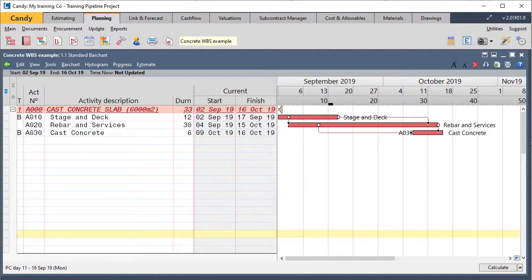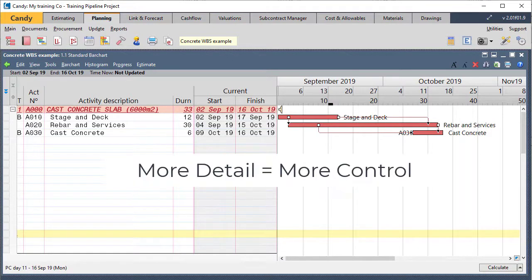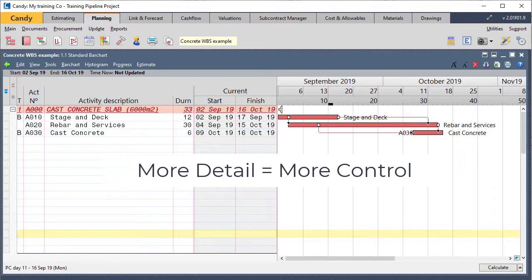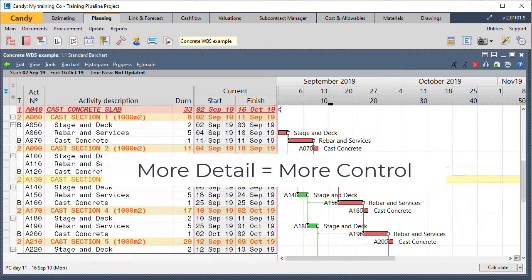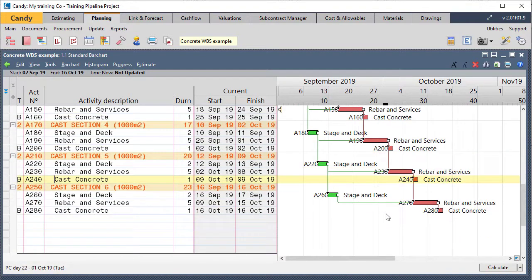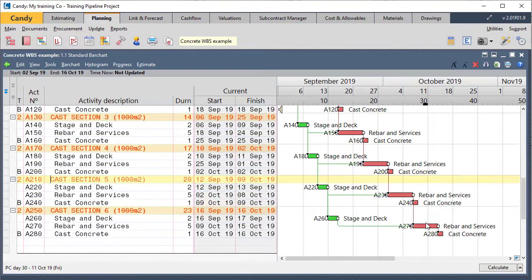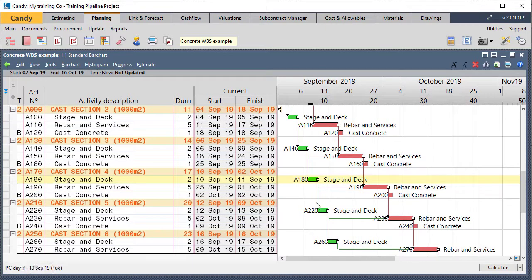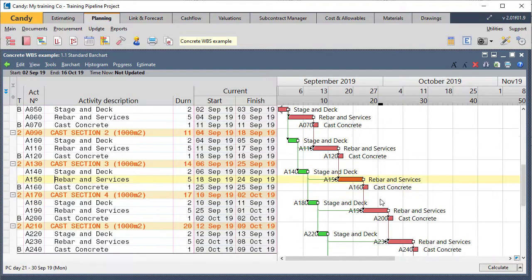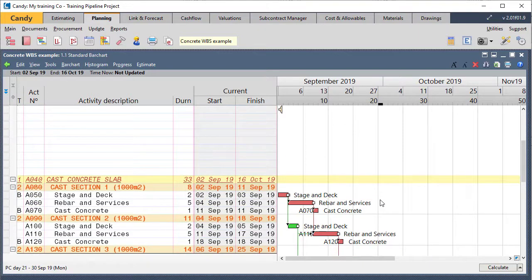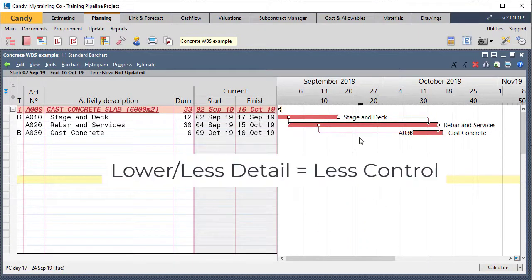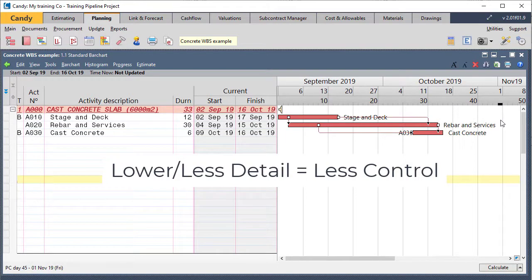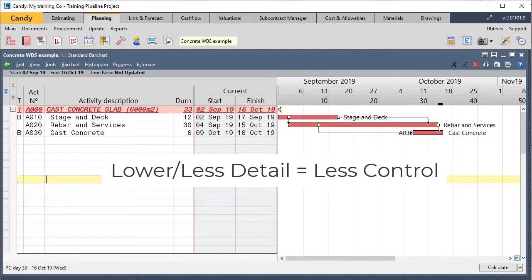So it's one of those rules of thumb to say, when we have more detail, increased detail, we have increased control. The negative of that is obviously it's a bit more work. Our schedule is a bit more complex, but our links are much easier, logical to interpret, and we've got a lot more control. If you have less detail, it's obviously less effort, but we lose in terms of control. So less detail also means less control in our schedule.